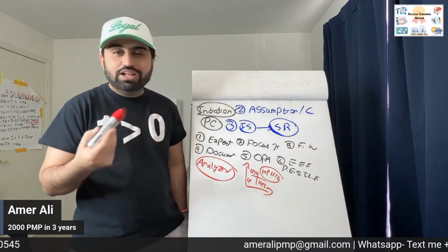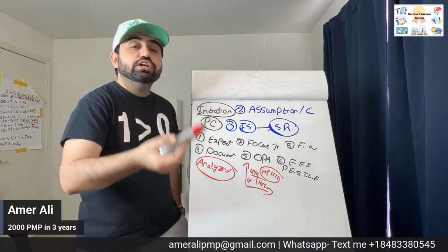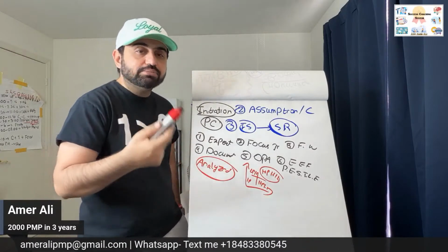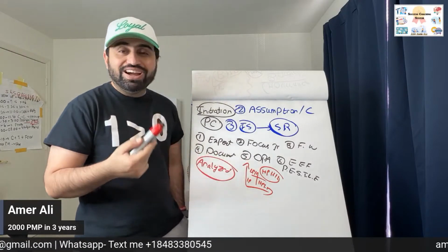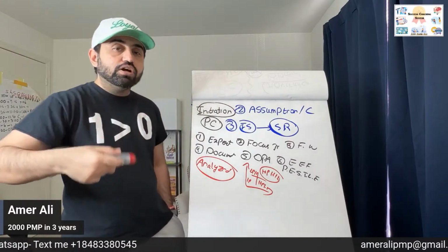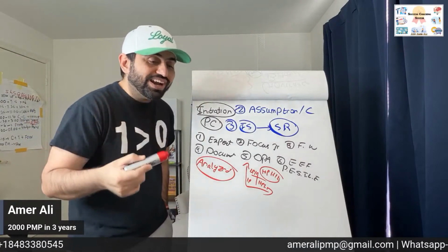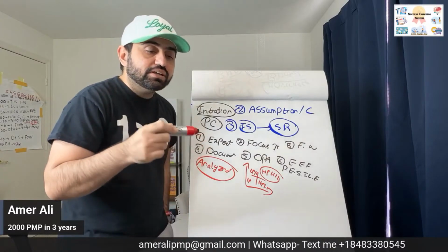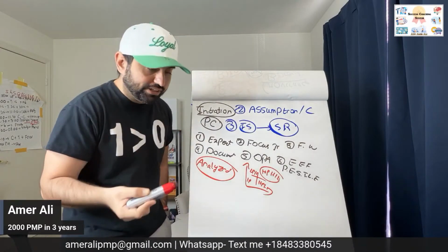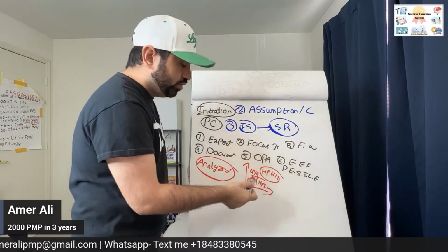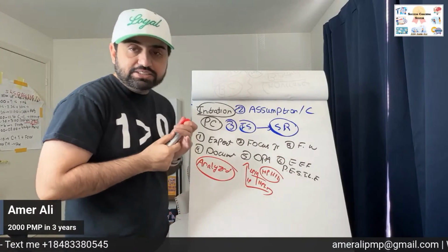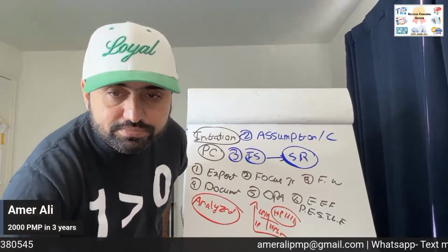Those stakeholders who have less power, less interest, you monitor them along the way. Those with high power, low interest, keep them satisfied. Low power, high interest, keep them informed. You are working with those stakeholders. You are identifying how to work along with them. You are trying to see what is the most effective way to work with these stakeholders. They are important stakeholders.